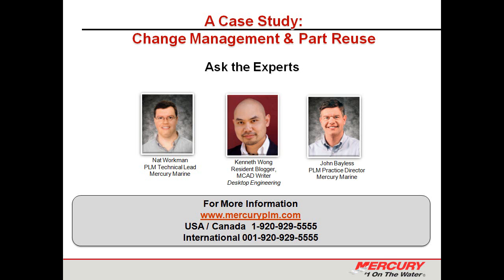Or there could be situations, for example, where we dual source a part, and so as a new supplier comes online, we'd set up a Class B change for that also. I can think of other examples when we have a part in the system and the supplier makes a change that needs to be validated in engineering. Then a current product request will go through our engineering processes, and once the current product request is being processed, then the current product engineer could initiate the change through the change board like we described during the presentation.